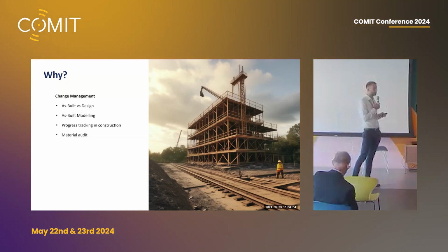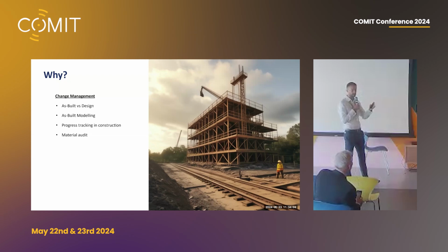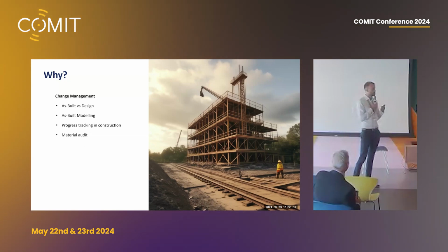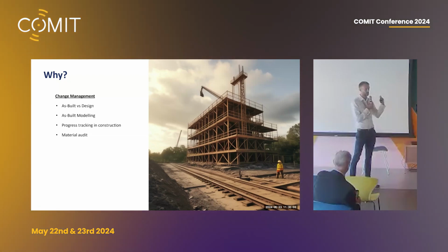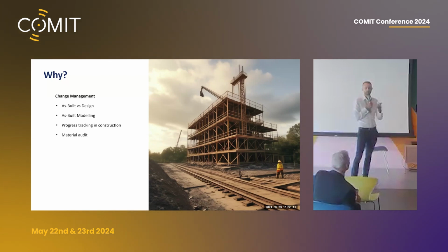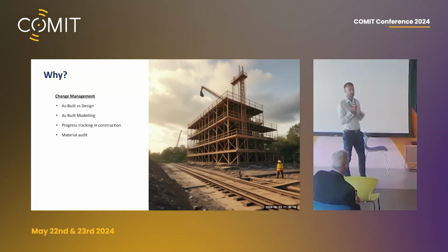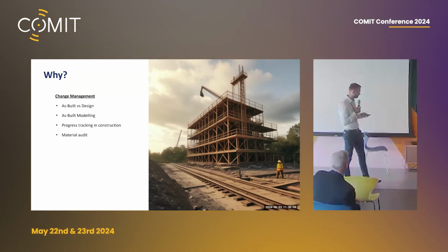We want to be doing the comparison to make sure our models are accurate. Crucially, progress tracking. We've been talking about that over the last couple of days as well. If we can do these change comparisons quicker and more efficiently, we can actually do this throughout the project numerous times to make sure that we're on track. And also things like audit. When it comes to the demolition of the building, we need to do our scans. We need to understand what is in the building or the infrastructure project before we can start dismantling it.